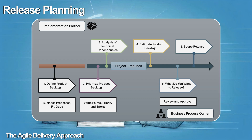What is release planning? Release planning is a six-step process involving multiple stakeholders from business as well as from the client IT unit. During this process, business owners, through the product owners, define the product backlog and prioritize the user stories based on business value. It is important that the scrum team identifies any other technical dependencies to complete the sprint. These dependencies, after discussions with the product owners, will also become part of the product backlog.